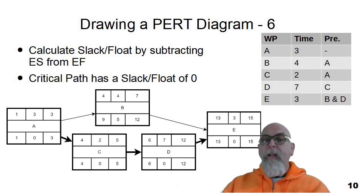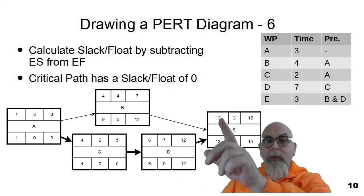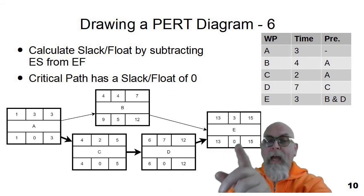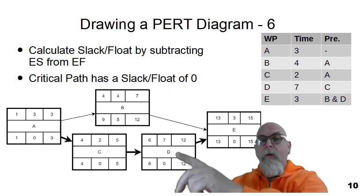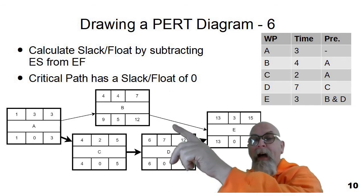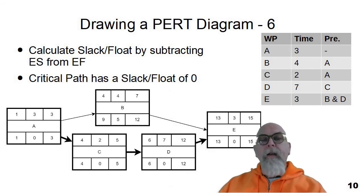Now that late start is calculated, early start, early finish, late start, late finish have all been calculated. The last thing to calculate is slack. Basically, we take early start and late start and subtract them and that becomes the slack. We can also do late start and late finish. That's a good way to check to make sure that you've calculated everything correctly. So thirteen minus thirteen is zero, six minus six is zero. B, four minus nine is five. C, four minus four is zero. And A, one minus one is zero. So the network nodes on the critical path will have a slack or float of zero.